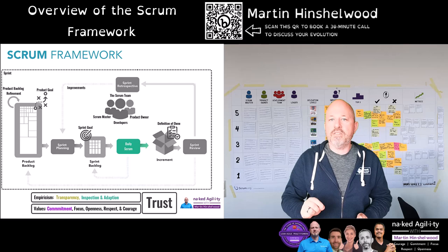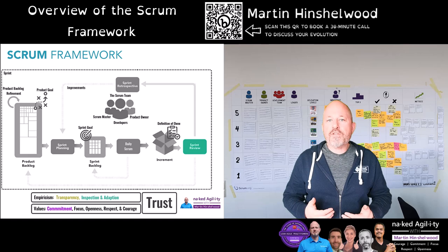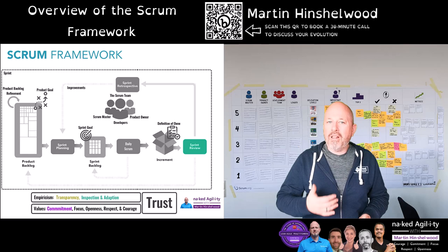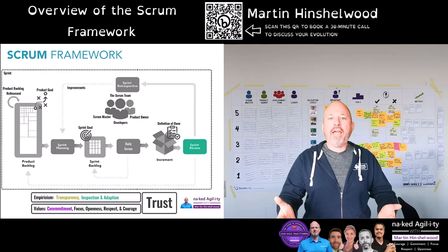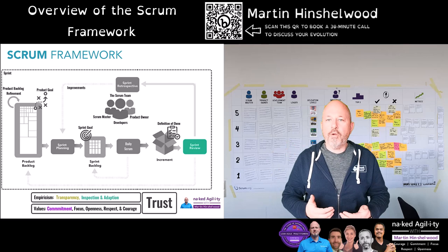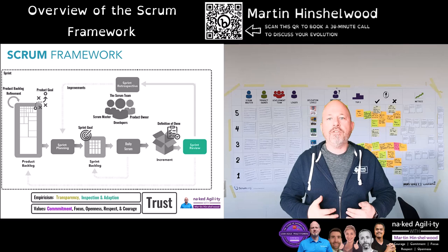The sprint review occurs near the end of the sprint. This event includes both the Scrum team and stakeholders, and is where the work of the Scrum team is offered for inspection. The purpose of the sprint review is to plan what's next and maintain transparency of the product backlog. We reconcile the impact of changes in the product, the business and the market since the last sprint review, and collaboratively update the product backlog to bring it in line with our current understanding of the future.